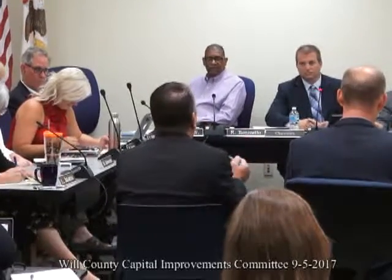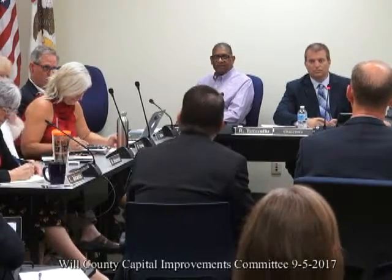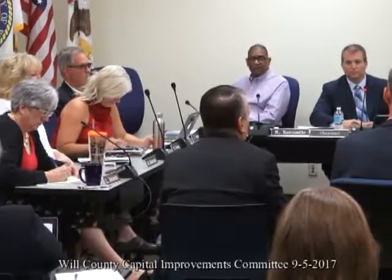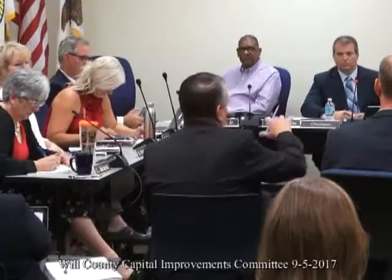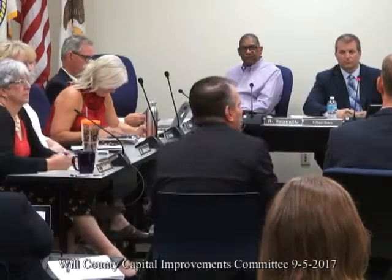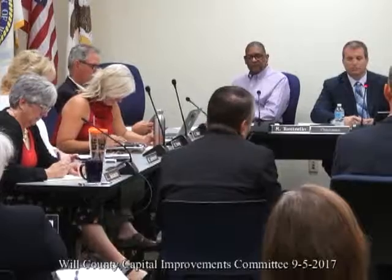However, I'm not going to feel great about this until they deliver their permanent engineered solution to our dual feed power for the new courthouse, and where they locate their new equipment and then come underneath Washington, or however that ends up happening, but that's probably the most likely scenario, to feed the new building. So that's the big ticket, and we're not there yet. We'll have a better handle on where they're going to be when we reconvene on the 15th.